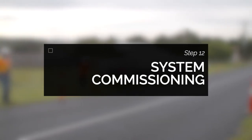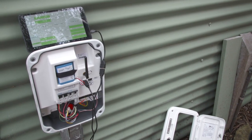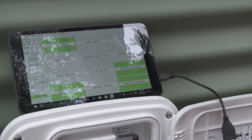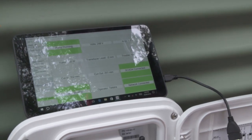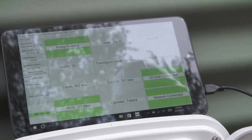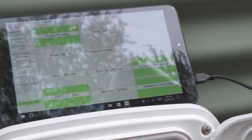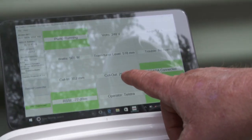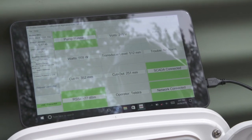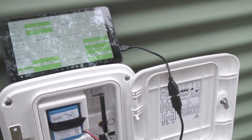Step 12: System commissioning. Ensure the pump is connected, boundary valve open and the level sensor carefully removed from the tank and placed to one side. Connect the battery cable. Press and hold the mute button and while holding, turn on the isolator and breaker switches. Ensure the mute button is depressed as this prevents alarm lockout during commissioning. Connect the tablet via USB and select the IOTA tab. The tablet will display the current data from the one box, showing 12 information boxes representing current one box data. The incoming volts should register around 240 volts and the levels should be close to 0 millimetres.